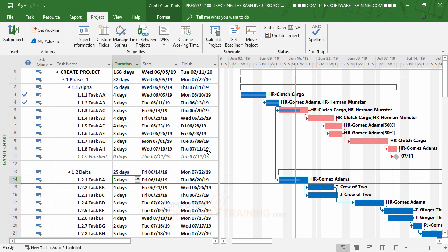Now, if one task was to drive from point A to point B, just because I put double the people on that road trip, the problem is that I can't make the vehicle go twice as fast, right? So adding more people doesn't do that. So I can't really rely on trying to manipulate that type of task.